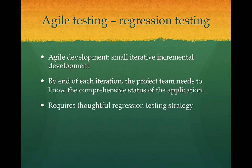If the comprehensive regression testing result shows no issue, then the project team can move on to the next iteration with confidence. And if there is an issue with the regression testing result, then the project team can decide what to do with that issue — it can be prioritized and addressed quickly.